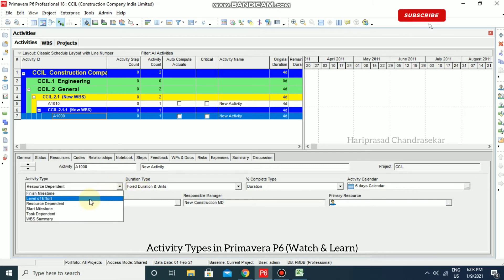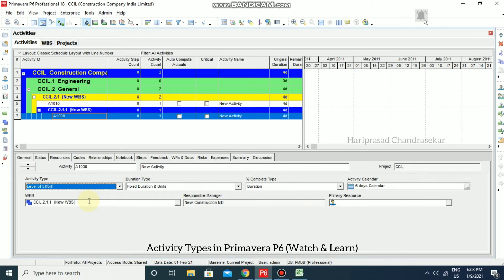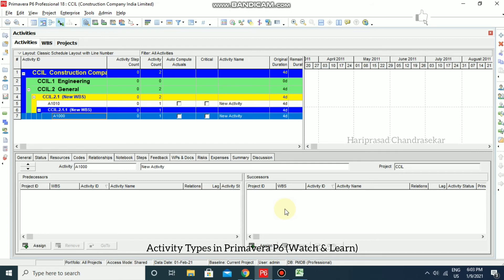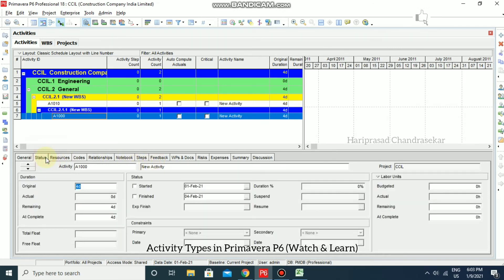Level of Effort is typically used for ongoing tasks that depend on other activities. The duration is determined by its predecessor or successor activities — it depends on those relationships. Examples include clerical work, security guard duties, meetings, and project management tasks. We cannot assign any constraints to a Level of Effort activity. If you go to Status, the constraints field is unavailable because it is a Level of Effort activity.